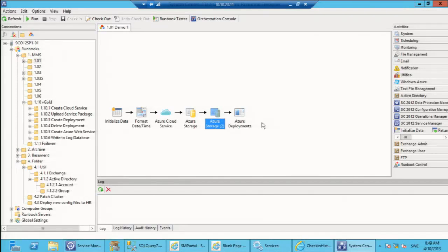So now we go. And as Pete said earlier, with Murphy's Law in mind, this is something around here you will understand, or you will understand whatever you missed during the planning phase, because it doesn't really matter how much time you plan your runbooks, you will most likely end up with something like, yeah, right, that activity didn't really work that way. Or we need to open another firewall, we need to do something else, we have to have a server on the secured network or something like that. So what you're going to find over time, you want to pad your authoring time, right? Add 25, 50% in there for a little margin of error.